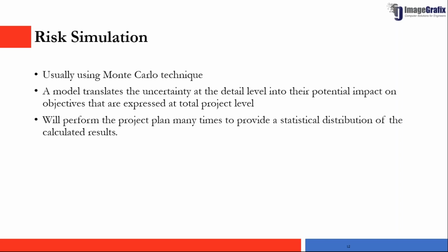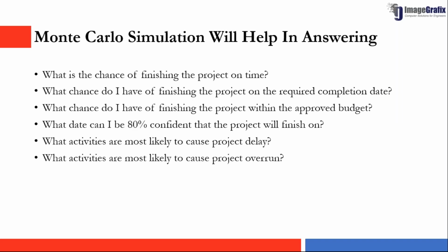Coming to the next, a quantitative analysis technique, which is Monte Carlo analysis. Monte Carlo simulation numerically evaluates expectations of functions of random variables for which no analytical expressions are available. So using Monte Carlo analysis, we can answer: what is the chance that I complete my project in time? What is the chance I complete my project within the approved budget? When will I finish, if I want to say I am 80% confident? What are the activities that might cause my project delays and project overruns?